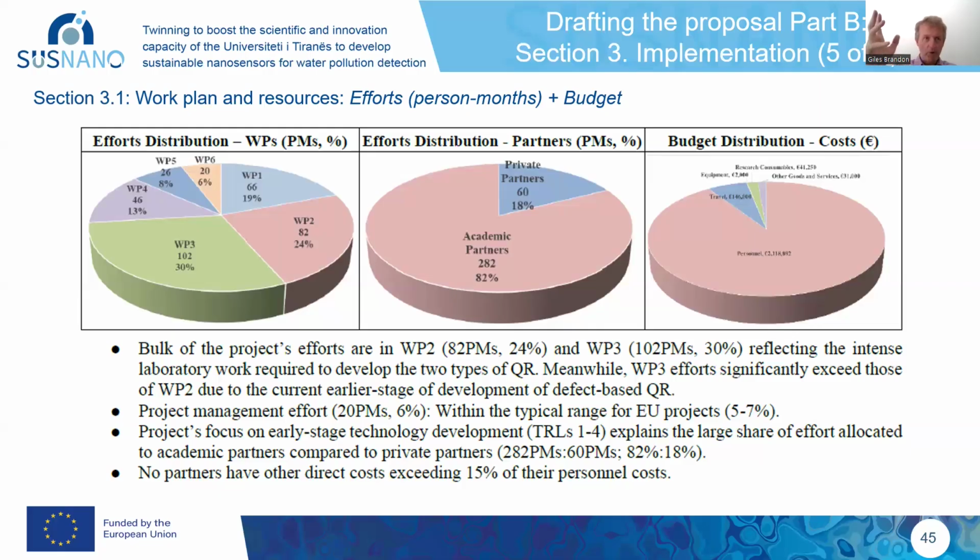That's not a requirement. However, if there are certain work packages, for example, in this case, work package 3, and arguably work package 2, they do have significantly more resource than the other scientific and technological work packages. So if that's the case, make sure you write just a few words to explain why it was necessary. If you do that, you'll be in a good position. Okay, so that's some words about work packages.